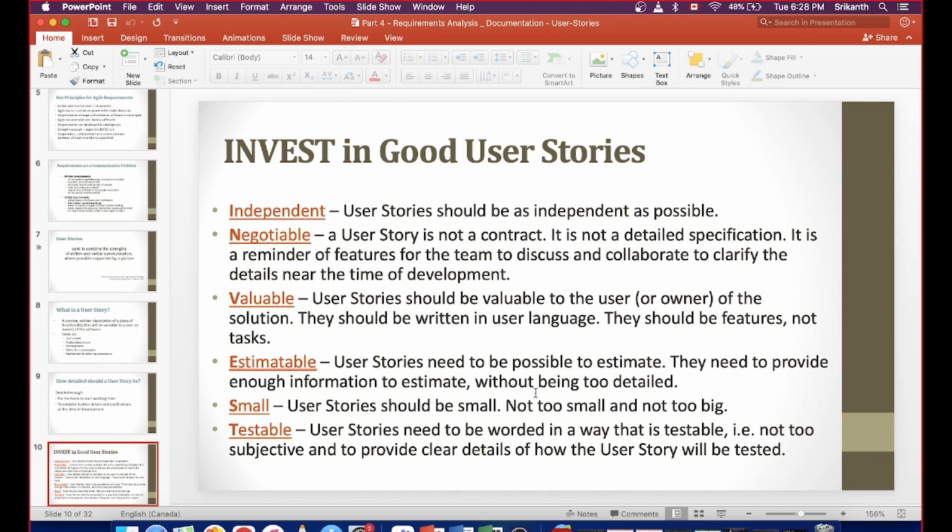After that, the Scrum Master combines the dev effort and QA effort and allocates an estimate on that story card. If you have 10 people in the team and a 2-week sprint, you will have 5 days in each week, so 10 days, so 80 hours, into 10 people.